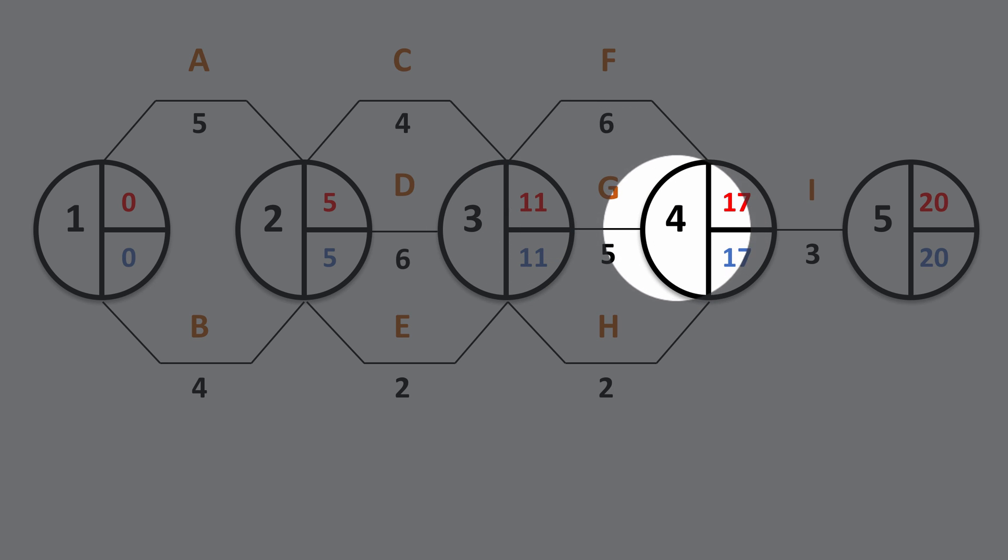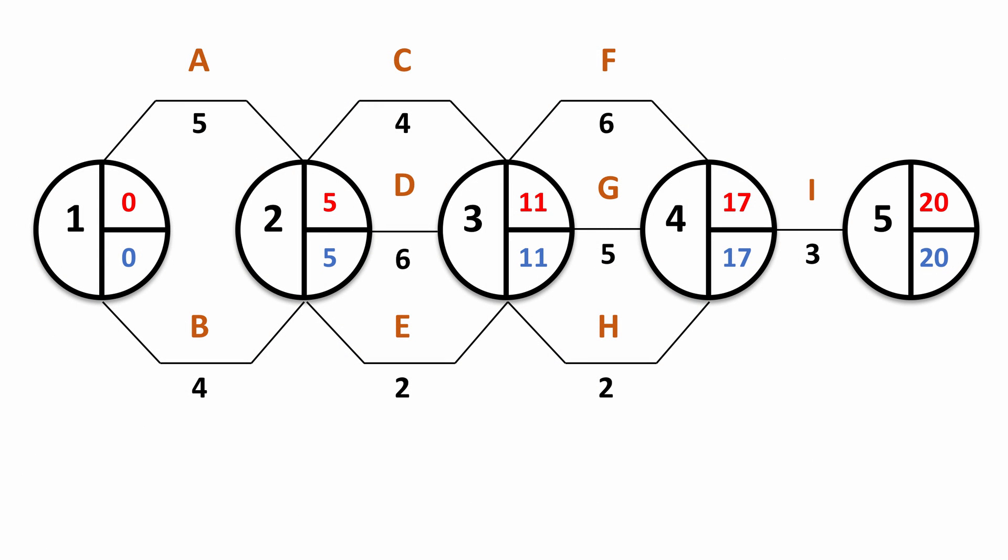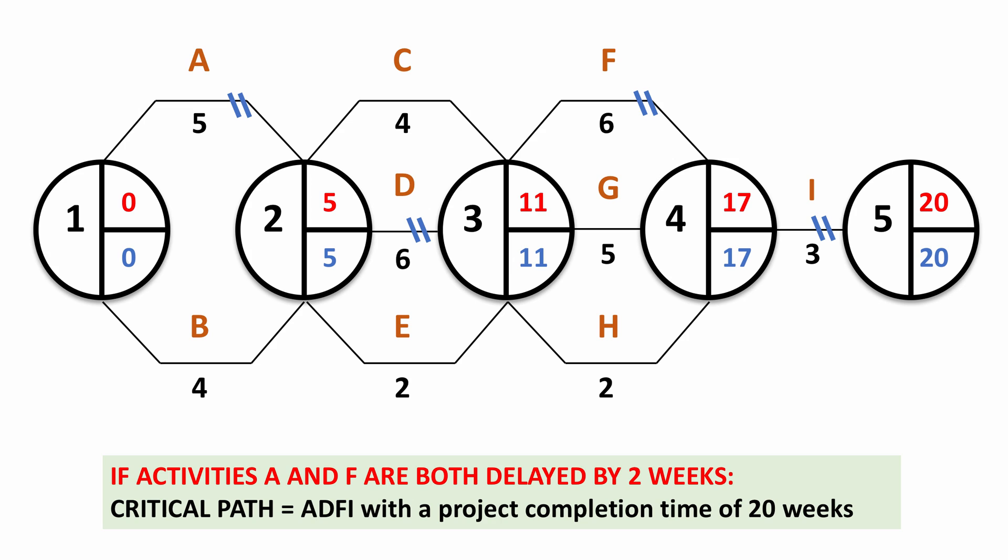So the effect of this has been to firstly make A a longer activity than B, therefore A is on the critical path, and F a longer activity than G, therefore F becomes part of the critical path. So the critical path is now A, D, F and I. And the overall effect on the network is that whilst both were delayed by two weeks, overall, the effect on the project completion time is an extra two weeks, not two lots of two weeks, it's two weeks. And that's because of the way that those two activities were treated the first time round on the critical path.